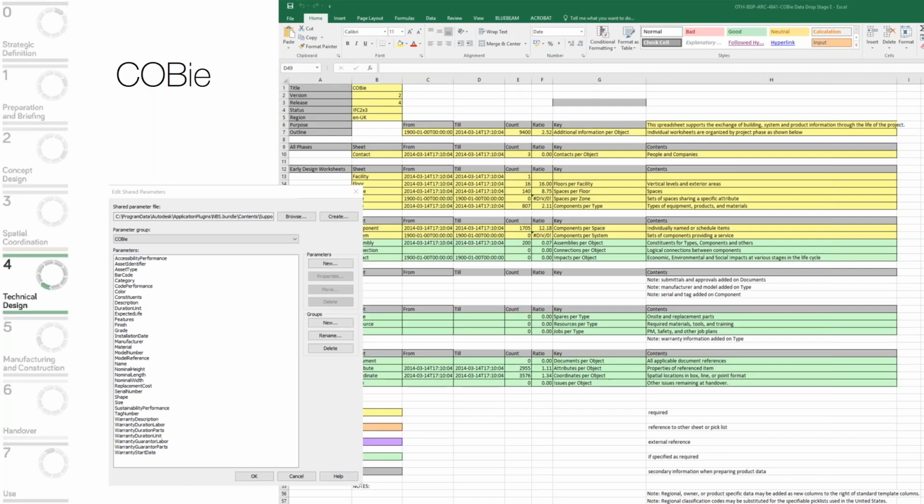So using the MMU, Manchester Metropolitan University example, they know what they want and they have limited their information requirements to just what they need to maintain their estate. That's great. That's the type of conversation we need to make sure that everybody's having. Because if you ask for everything, you could spend months compiling information that's never used, and actually by focusing your information requirements, you can zoom in on things which will benefit the client in the future.